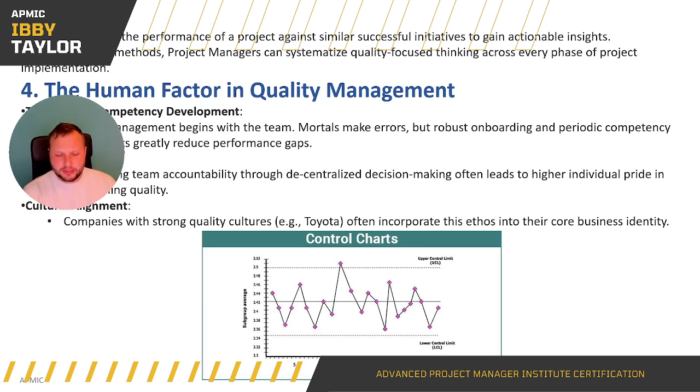That's the average. That's kind of where you want to be, in and around the average. You've got the upper control, you've got the lower control. As we can see, there is nothing that breaches the lower control limit, so that's okay. We do, however, have a data point that is above the upper control limit. So that would normally indicate an issue and indicate something that needs to be looked into further.